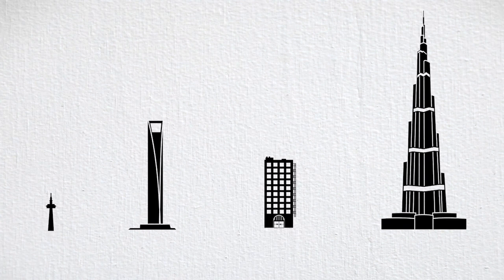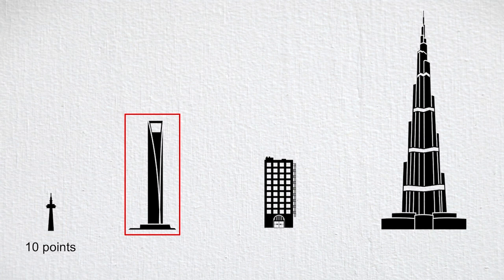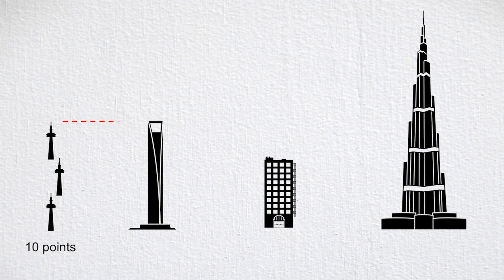Let's explore another option. First, let's classify the buildings into what we'll call effort classes, with the smallest building considered a 10-point class. The choice of 10 is arbitrary – it could have been 100, 1000, or any number for that matter. You'll soon see why it makes no difference. We take a look at building two, and we think it looks about three times the size of our 10-point building. Therefore, we classify it as a 30-point class building.